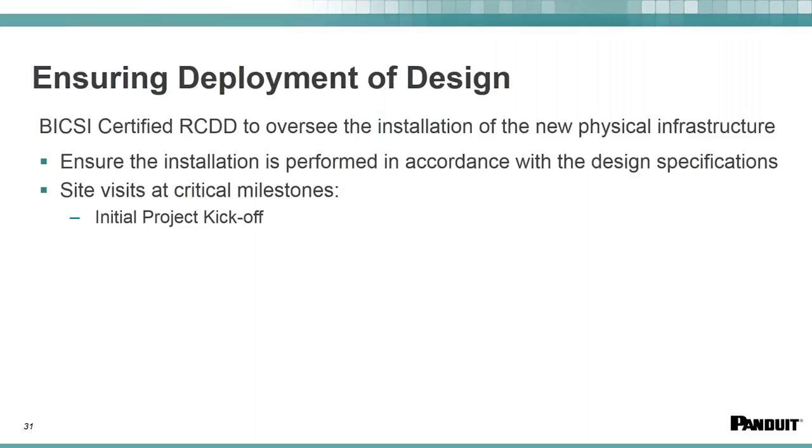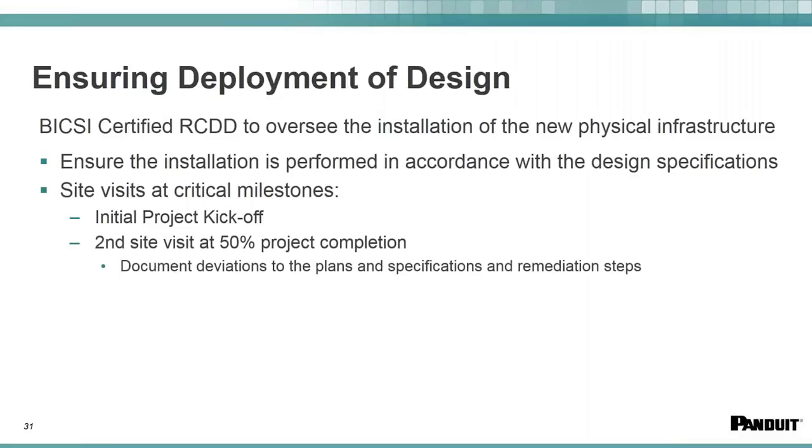What we will typically do is have the designer of the system be there at the kickoff meeting, and he'll walk through the solution with the installers. Then we'll come back at about the 50% completion stage to make sure that everything is going according to plan.